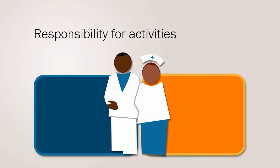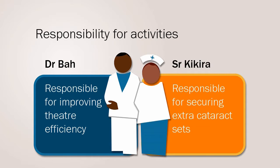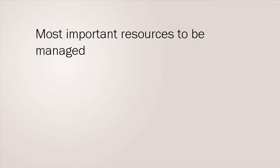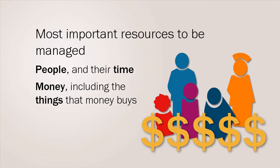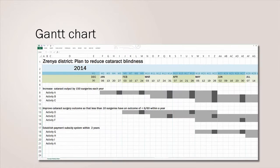A named person must be made responsible for each activity. This person is responsible for managing the activity and ensuring it gets completed. The most important resources that need to be managed in an activity are people and their time, and money including the things that money buys. To manage time, an activity time plan such as a Gantt chart is developed. Each activity per objective is listed along with an indication of when it will be carried out and completed. This is monitored and updated as the activity is carried out.